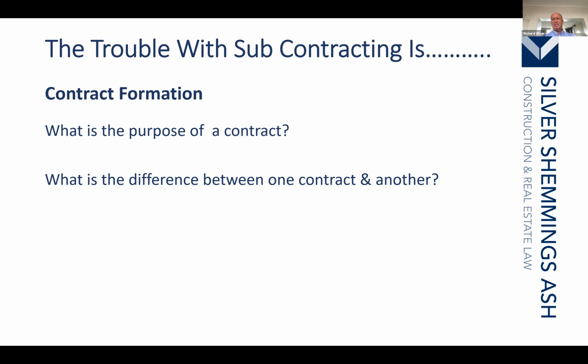So then the question is, if we've got these amendments, why are they there? And why would we use, for example, the NEC as opposed to the JCT? Or why should we use the JCT standard form rather than the design and build? Well, what the contract is effectively doing is allocating risk. If we look at the design and build contract, not only is it setting down the procedures that you are to adopt when a contract is in place, so, for example, if you are being delayed, the reason you have to issue an extension of time notice is because the contract tells you you must.